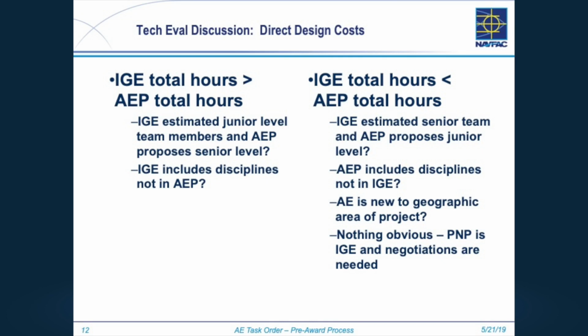Same thing there. Is the AE new to this base? They may need more hours because they have to learn the base. They have to learn where to go, what the rules are. If they've worked 50 projects at Pensacola, that's not a concern. If this one's at Pensacola, and they've never been there before and this is a new AE, they could have a case for more hours.